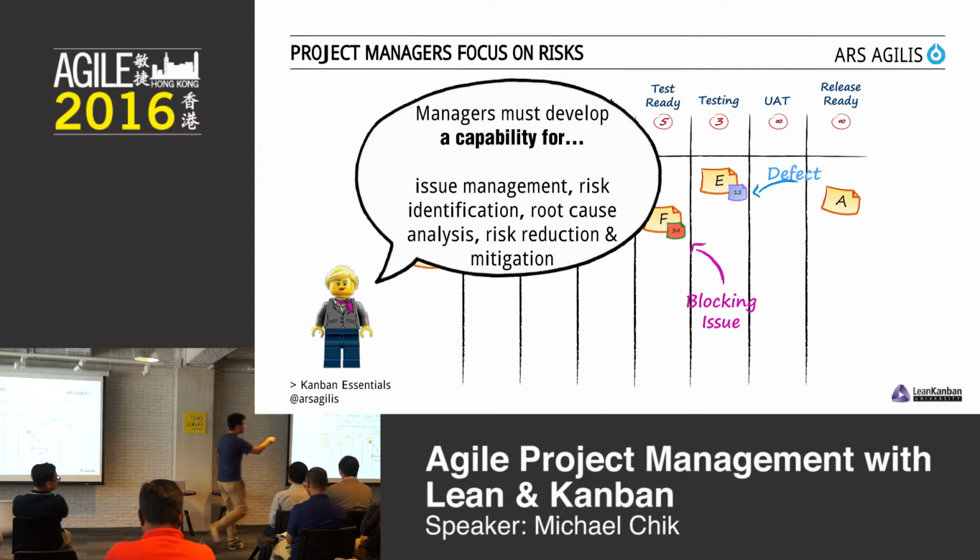So for us, it is in testing. We found a bug. You have to fix the bug. Until we fix the bug, you cannot leave testing. That's the whole thing. Unless you decide, as a business decision, we can live with the bug. That means that your testing of this particular feature is not in progress. Testing has been started, but has not been finished. Yes, so it is blocked right now, and it doesn't consume any effort right now because it's under testing.